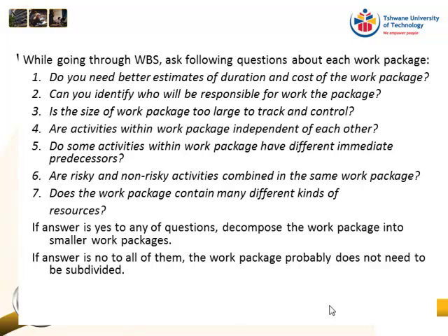Okay, so are activities within work packages independent of each other? You want them to be independent because as soon as they become dependent, they should actually be in one work package. Do some activities within work packages have different immediate predecessors? If you can't sequence things logically, then your work packages must be broken down further.